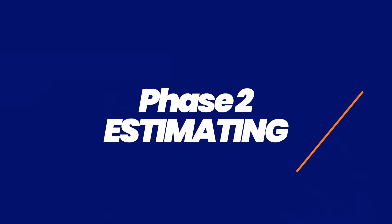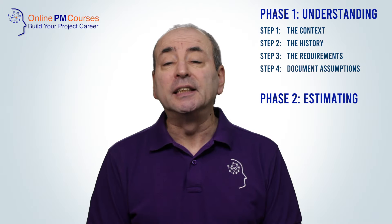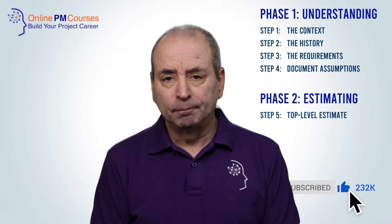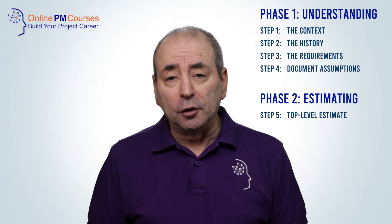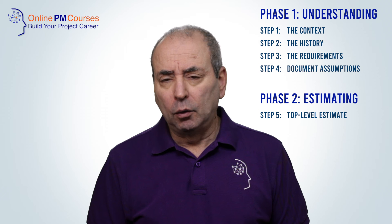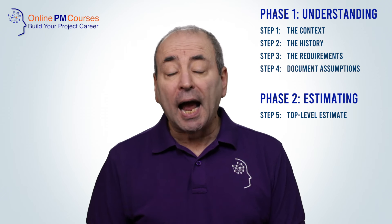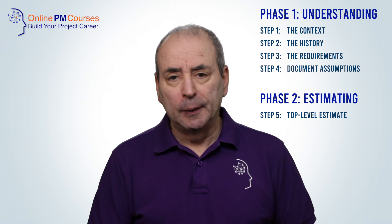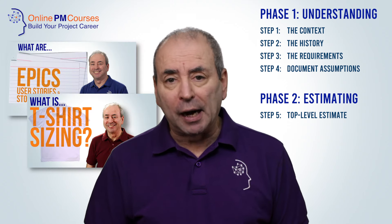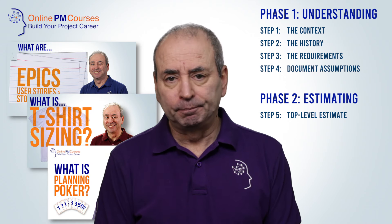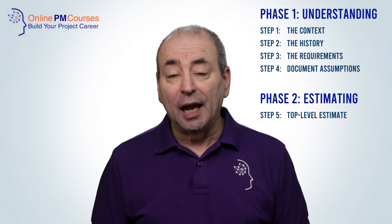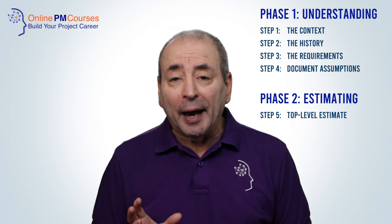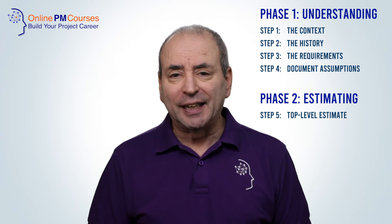Phase two: estimating. Step five is to make an initial top-level estimate. Start with an initial high-level estimate. For this, you can use order of magnitude estimating, top-down estimating, parametric estimating, or simply expert judgment. Agile estimating techniques work well here too — story pointing, t-shirt or bucket sizes, or even planning poker. What matters is bringing your experience to bear and choosing a simple process that gives you a rough idea of the scale of the schedule you're going to need.